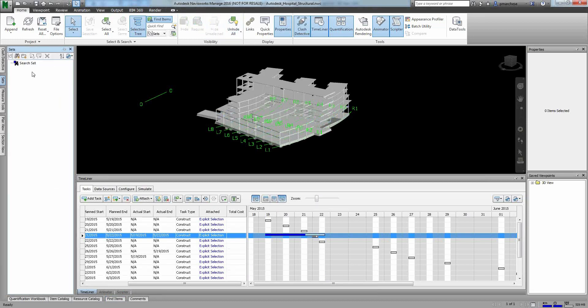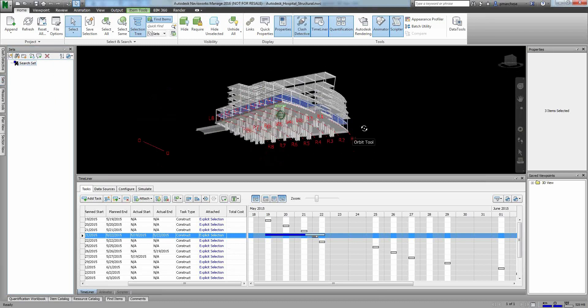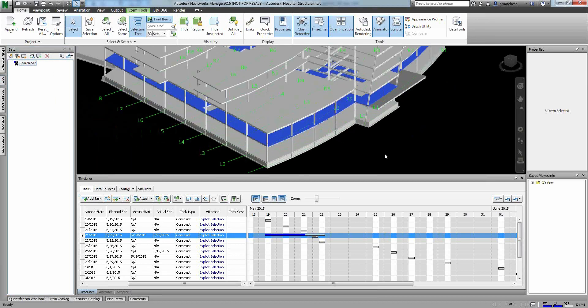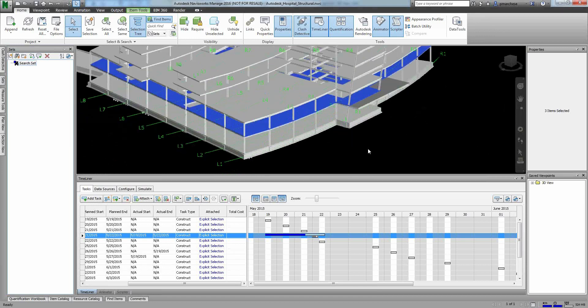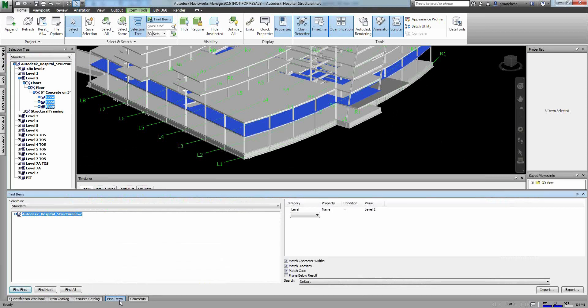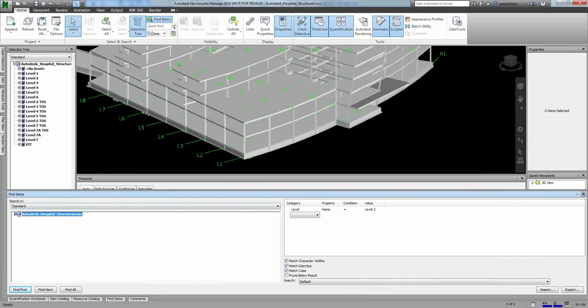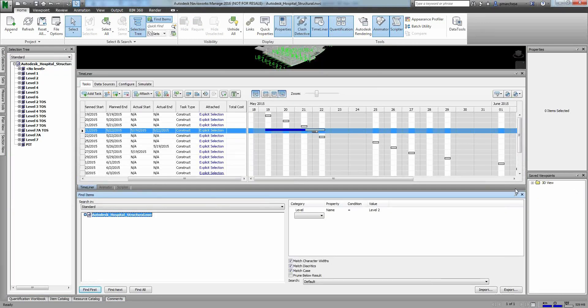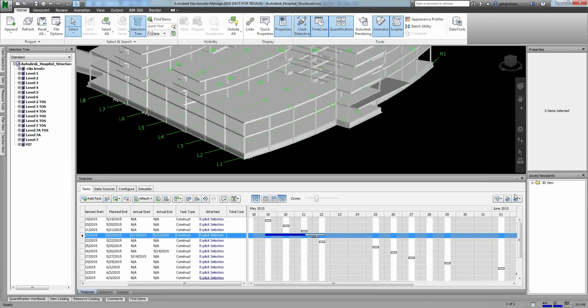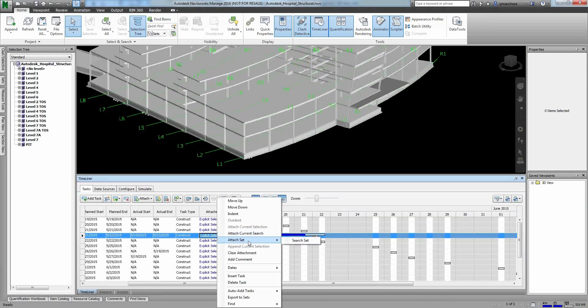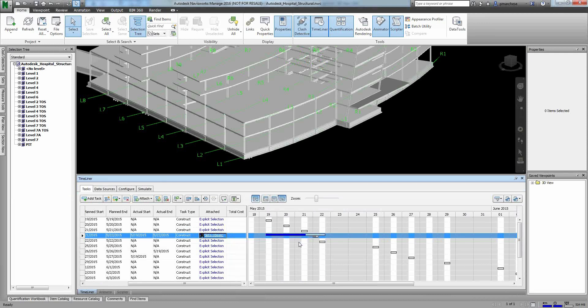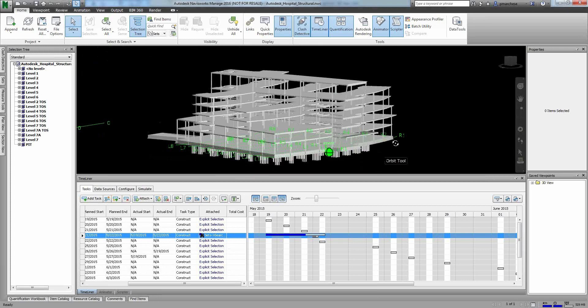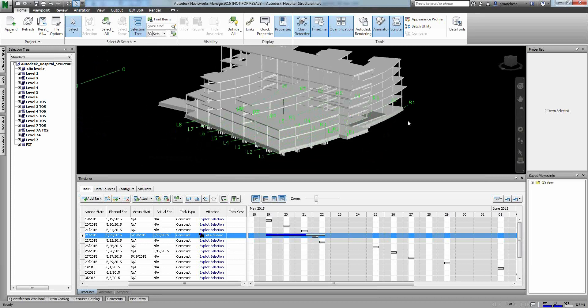And I save my search. Now the benefit of this is every single time I click on that search set, it runs that search again. That's the key. It doesn't matter what happens in this model. If I get an update of this from the architect, the engineer, my subs, it's still going to run that search and find every single thing that meets my requirements or whatever data I'm looking for. So when I'm actually doing a Timeliner and I want to make sure that my information actually works, I just assign - rather than saying explicit selection, I attach that search set. So now every single time I run this, it looks for the content that meets that search set and then shows that data in the animation. So that ensures that the information is always up to date.